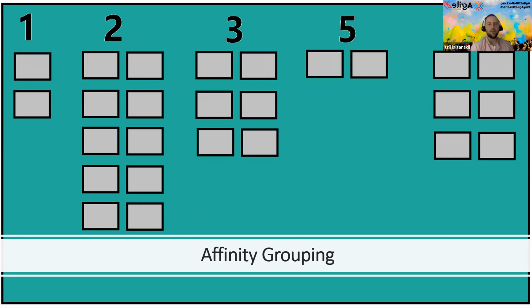But the issue is, as you said, when you pre-allocate the task, so some team member says, okay, I'm going to do that, but in fact he or she is wrong in this assumption, and as a result is not able to complete the task during the sprint. Well, that's an issue, and here is where we need to have some additional coaching practices in place from the Scrum Master.